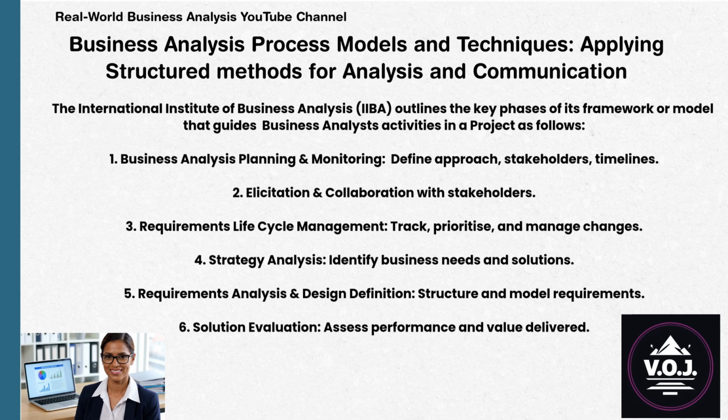This includes maintaining requirement traceability, monitoring changes, and ensuring that all requirements are implemented according to the agreed user acceptance criteria. The BA also ensures that no requirements are missed and helps control scope by preventing unnecessary changes or scope creep. Throughout this phase, the BA works closely with stakeholders, developers, testers, and project teams to ensure the final solution meets business objectives and delivers the expected value.